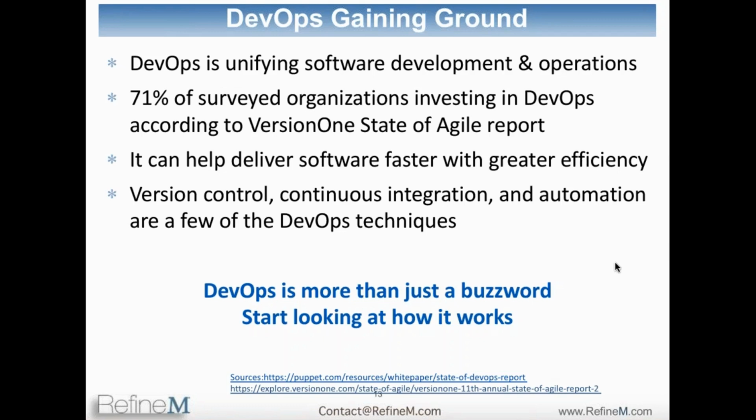So if you are part of the agile team, if you are a project manager, or a scrum master, or if you are leading agile transformation in your organization, make sure that there is a DevOps team. Maybe just 2 people, but a DevOps team that helps the development team and paves the road for them at least 2 weeks ahead, 2 sprints ahead of the development. Extremely important part of DevOps. I will stop here on the DevOps.